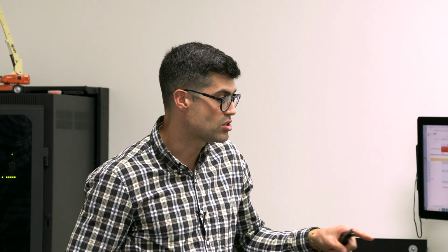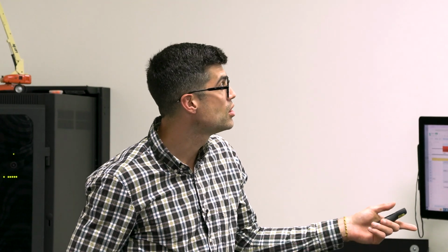And just say, listen, there's a range here, choose, I'm basing off an average, I'm looking out to make sure we don't have a change order in the future. And again, it could be an escalation of cost, it could be product, it could be that stage in the CAD. Instead of putting an allowance, put a range. And that way, when you're presenting that estimate, there was nothing that you pulled over their eyes or that they're going to have a question mark with later, right?